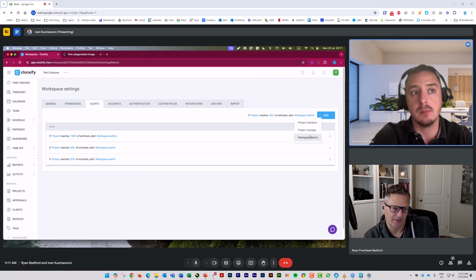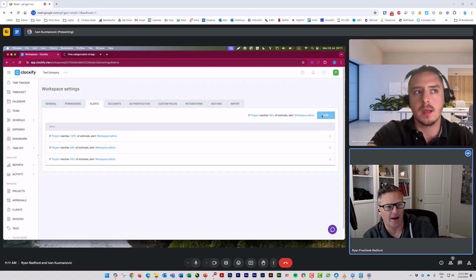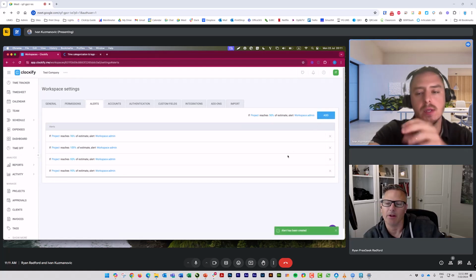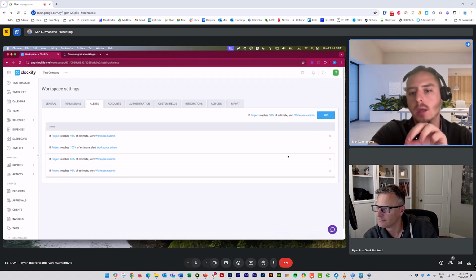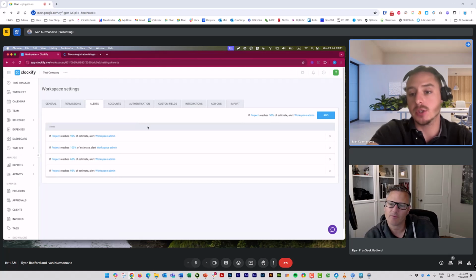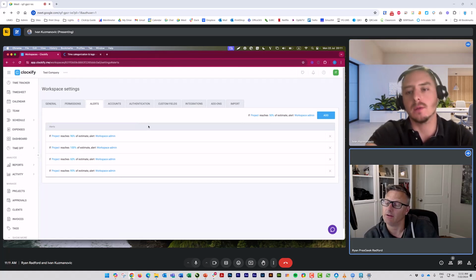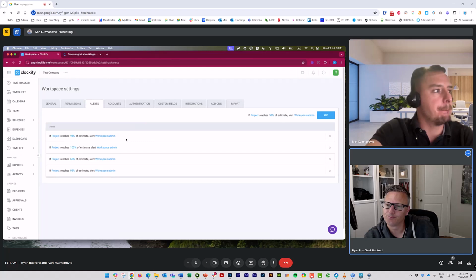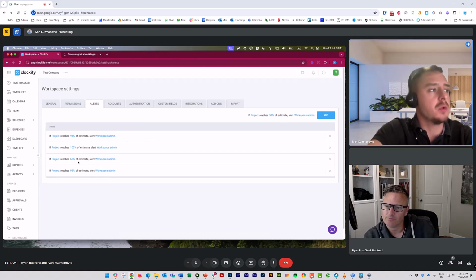So workspace admin, project manager, or all members. And that comes in an email or a notification in the app? It comes as the email. So the email will notify you, hey, Ryan, your project sales deck is at 96% of its time estimate. So please take care of that. Yeah, I really like that. Yeah, okay. So you can always select a couple of alerts.